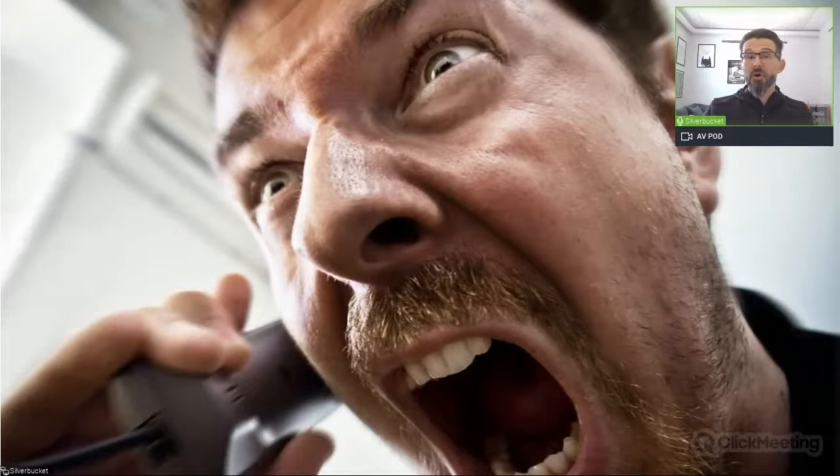How to avoid this? Well, we need to have clear rules that everybody follows and everybody knows. No one is shouting to a megaphone or is making secret commitments. In the resourcing plan, there must be one truth only, which is visible for everyone. And there must also be a well-defined process how to change that plan, and everybody must, of course, follow the process.